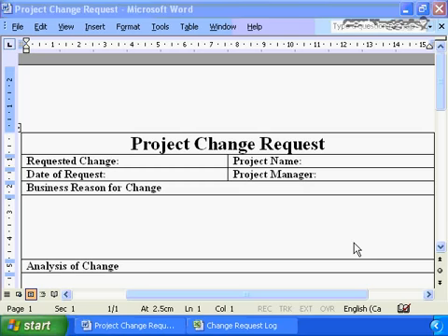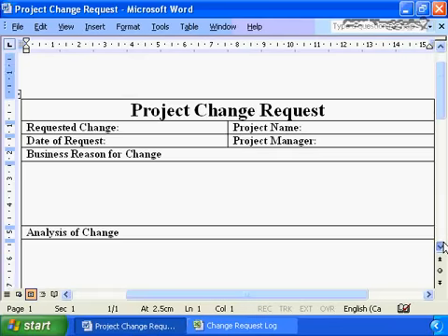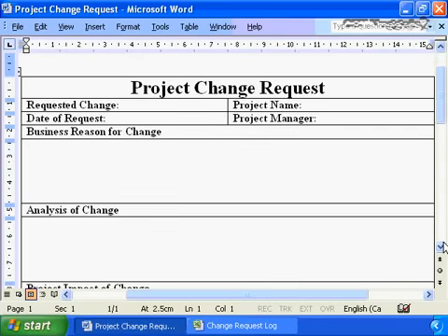So what constitutes a project change? What warrants entering the information into the project change request form? The answer is all change. But it's a more defined answer than that. It's all change to an approved, signed off project fact. Once the scope statement is produced and signed off, any changes to the project scope must be documented through the change request process. Once a deliverable, the requirements definition document, is complete and signed off, any changes to that deliverable must be processed through the project change management process.